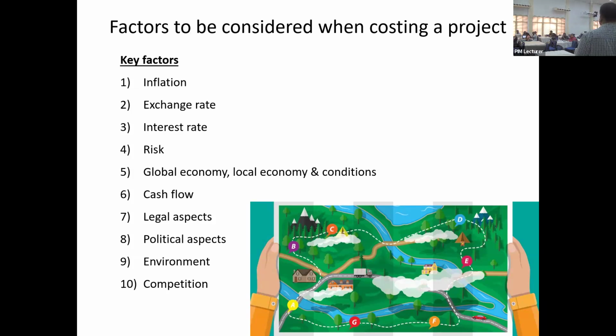Year after? So how do you price? Difficult. So we go to the central bank report. We get a 5-year forecast, which we all know is wrong. Last year, they forecasted 5.5% growth, and we grew at 2% or 2.5%. The year before, we forecasted 4.5%, we grew at 1%. So all these top central bank guys, they can't get it right. So inflationary adjustment is a huge problem when you do a long-term project in an unstable country.